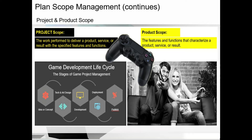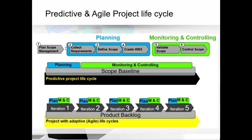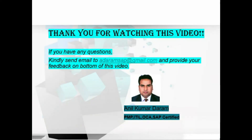In a predictive life cycle, the scope baseline is already defined and you proceed with monitoring and controlling activities. In agile and adaptive life cycles, planning and monitoring are set for each iteration, and each iteration provides feedback which helps the next iteration in terms of product backlogs. We have covered the basic introduction to scope management, its keywords, and scope management processes. In the next video we will discuss each scope management process in detail, starting from plan scope management and ending with control scope.